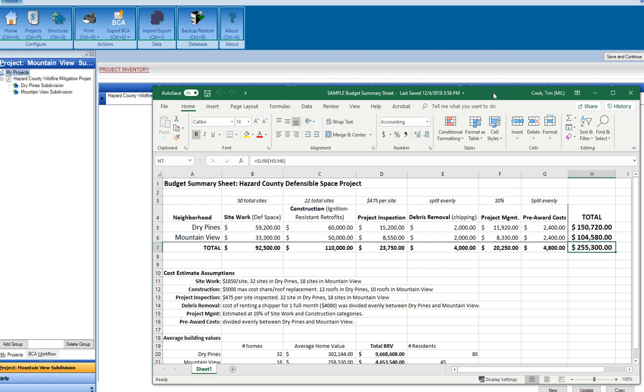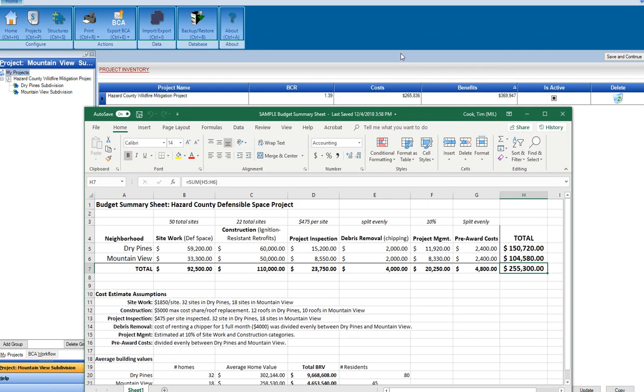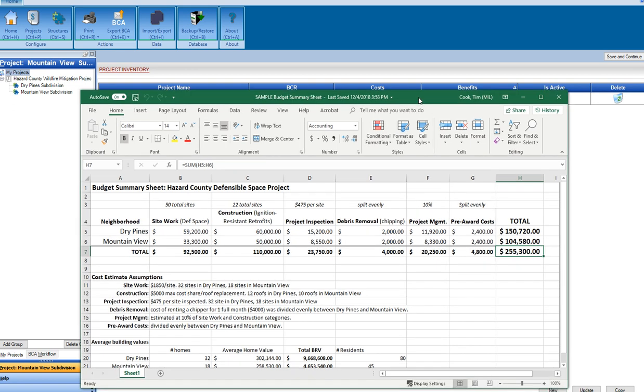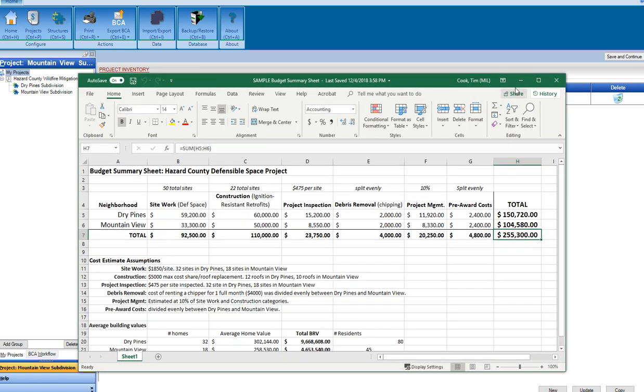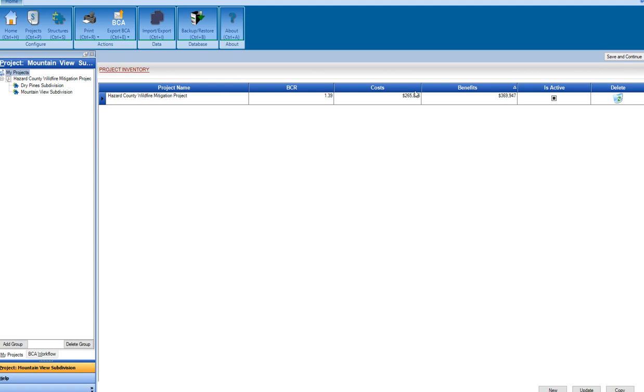Because that would suggest that I have not, in my BCA, captured all of the project costs. So as long as your number on this line is higher than the budget you're proposing, then you're probably fine, because again, it's including the overall maintenance costs over a period of time, well beyond an application budget.